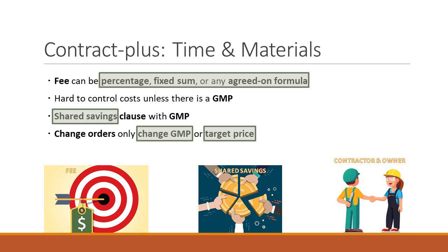But let's say it comes in at $900,000. Well, there's a $200,000 savings there. So now you have a 20% split. So now you have, I said 200,000, it's 20,000. Sorry, not 200,000, 20,000. But if you come in 200,000 under budget, the shared savings is you give them 40. So now it costs 940,000. Even though we said it might be 1.1 million, if it comes in at 900, you pay them 940. You're still under the million that the lump sum person did.